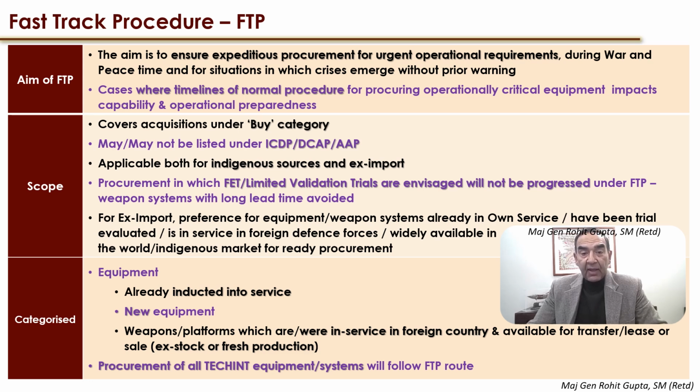Now, wherever field evaluation trials or limited validation trials are required for a particular piece of equipment, these cases will not be progressed under the FTP. It's obviously time. So the time taken during these trials is saved during FTP. It is urgently required, is the key point. So long lead time procurements are avoided completely.